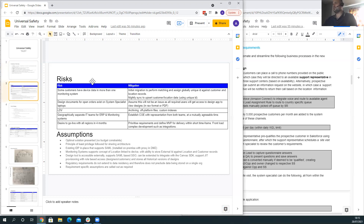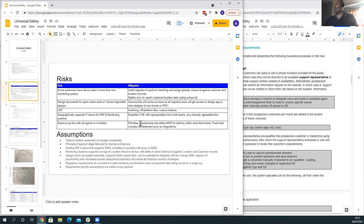In terms of risks, a number of customers are between different monitoring systems, so to mitigate this during migration we need to assign a globally unique identifier, synchronized into those systems on a nightly basis. Design documents being on laptops will be mitigated by utilizing the design tool as the predominant way of viewing that data. LDV has been identified as part of the solution, requiring archiving with off-platform files and custom indexes. Geographically separate IT teams mean we need to establish a COE, and the desire to go live in four months means we need to prioritize requirements, define an MVP, and front-load any complex integrations.